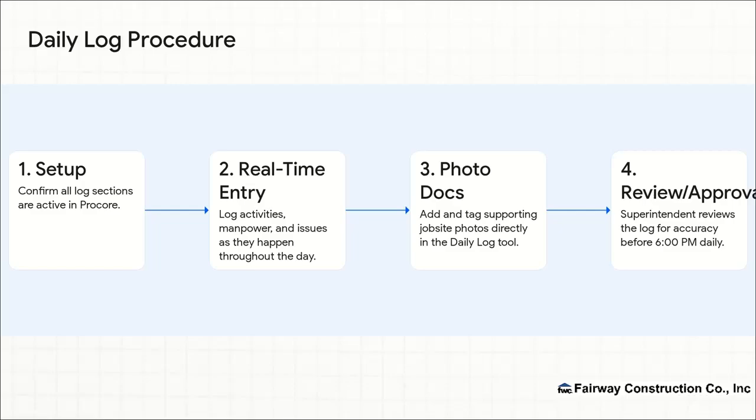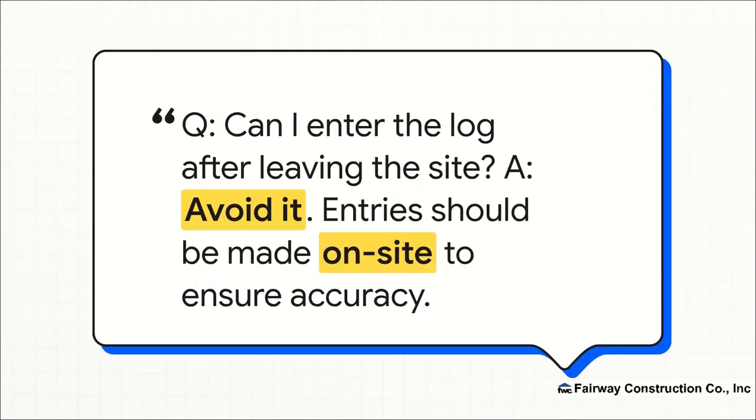Third, back it all up with photos. Add and tag them right there in the daily log tool. And finally, the superintendent has to review that log for accuracy before 6 p.m. every single day.